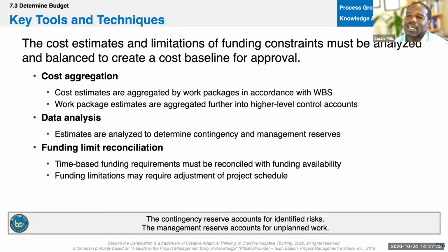You'll see this in contracts, an act of God. And even then, in California, earthquakes are known unknowns. Okay, we know something's going to happen. We just don't know when it's going to come. So if an earthquake comes and it damages your home, did you have earthquake insurance? Because your homeowner's insurance will not cover that. Now, if we get a hurricane here, even a category 3, we're going to go nuts and our insurance would kick in because that'd be an unknown.